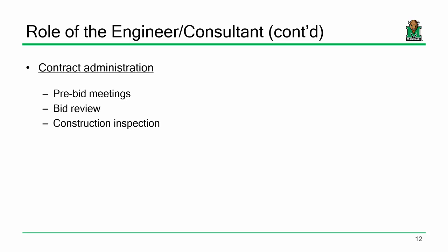I mean, if you're a developer and you're going to spend $50 million building something, you want some assurance that the folks that you're paying to complete your structure can actually do it. If not, then you're throwing your money away, okay? So it's not always the cheapest bid. Now, if it's the difference between 53.5 and 53.7 and it's the same situation, yeah, you're probably going to go with the 53.5.